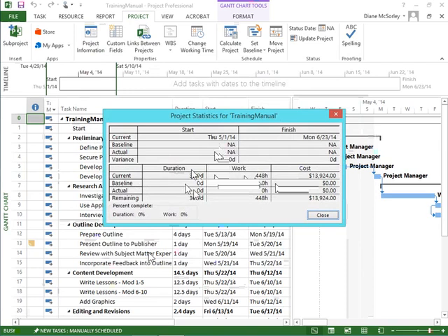As tasks maybe need additional resources to get completed, or we add an additional task, things will change. The values in the current row will change. The actuals will change. The baseline will always stay the same. So when you're done with the plan and we want to know, what did we think we were going to do and what did we actually do? You can compare the baseline to your actuals and always know. So there you can see, no baseline recorded, nothing up my sleeve.